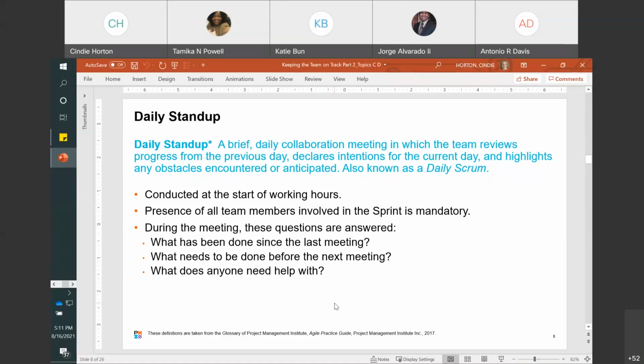During the meeting, these questions are answered. What has been done since the last meeting? What needs to be done before the next meeting? And does anyone need any help with anything?